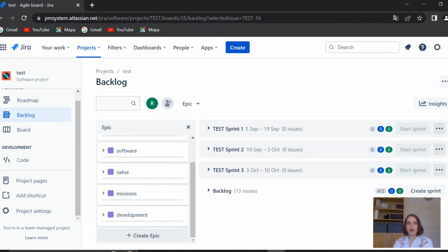Today we will use what we have learned from our previous lesson and continue our work in Jira Software. We will take up evaluation and planning work in our project. So first of all, you should go to the previously configured Jira Software, then go to the backlog page right here and create a sprint.